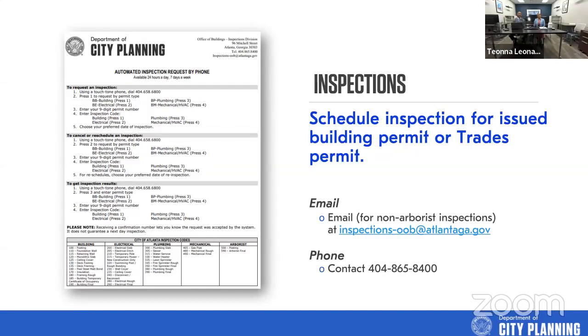Go ahead. I was going to add to the third-party inspections. While you are able to schedule third-party inspections, the building permit fees that we spoke to earlier include the cost of city inspections. So if you opt to go with a third-party inspector, you're basically paying double for inspections. We're not going to give credit for you hiring a third-party inspector. That is your choice, but the inspections are included in the City of Atlanta permitting fees.